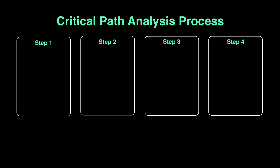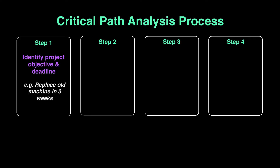Hey guys, how's it going? Hope you're all alright. In this video we're going to learn how to construct a network diagram which is then used to perform our critical path analysis. This process has four steps and the first step is to identify what the company is trying to do — the project at hand and its objective, which will obviously include the deadline. For example, replacing an old machine in three weeks.